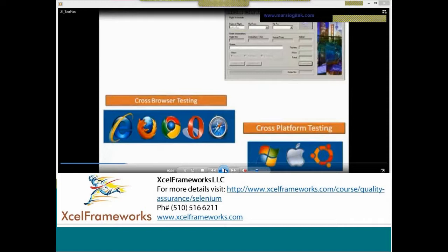That's the exit criteria. If all the tickets are closed and the application is working smoothly, then we can easily exit, and we do a release note saying that these are the bugs that still exist in our product. These are only P3, P4 issues. We will take them in the next release. Because the customer is waiting, we need to give the build back, right? If P3, P4 are not really impacting any business, then you can release. So you should be very, very cautious in defining this test plan.